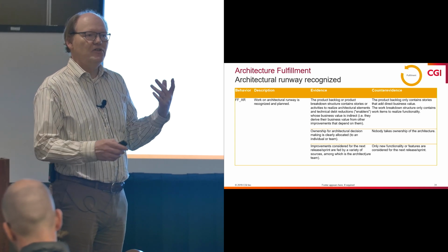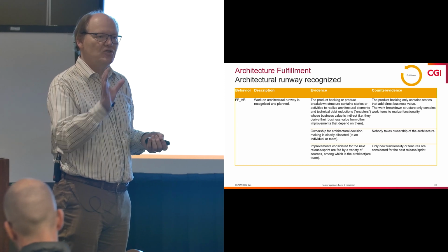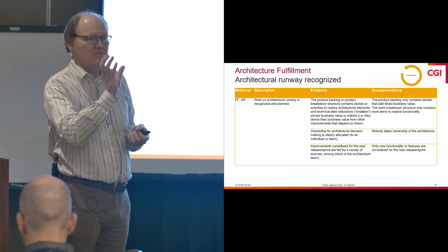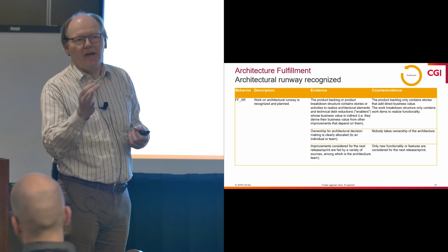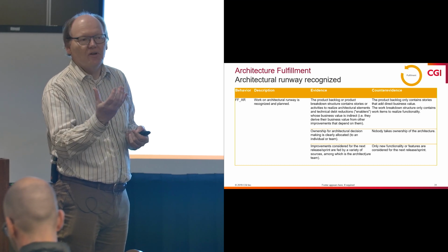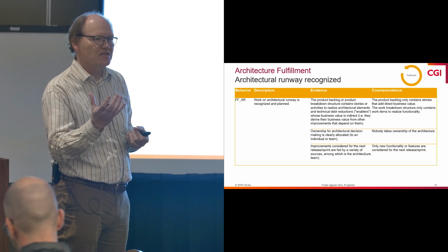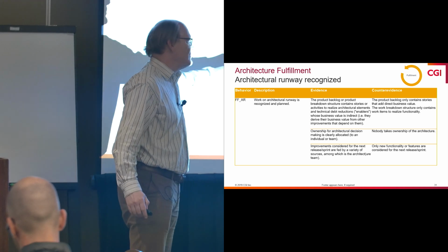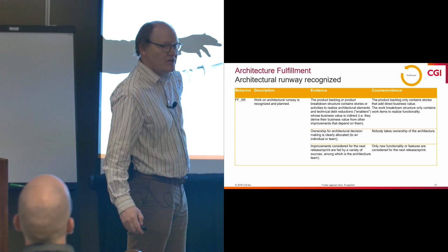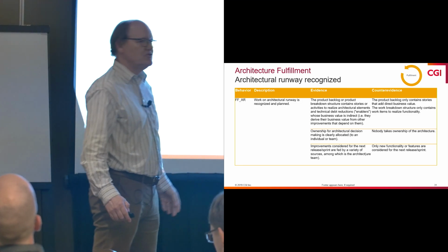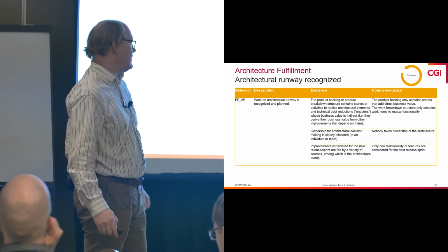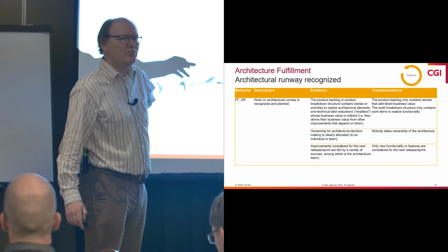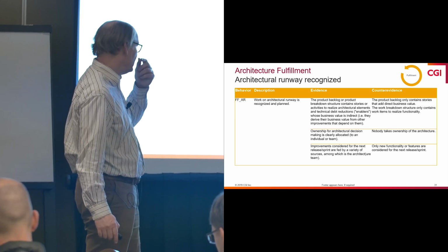If the team or the product owner decides what goes into the sprint backlog, how do they do that? Do they only prioritize by business value, or do they actually have a reserved amount of capacity also for these enablers, as they are often called, right? Is the ownership of these yellow and black, or the yellow things in this case, clear, or does nobody take ownership of that? It's also good if the whole team takes ownership, right? I'm not saying here that one particular person should do it. It should be clear, but it may be, of course, the whole team.